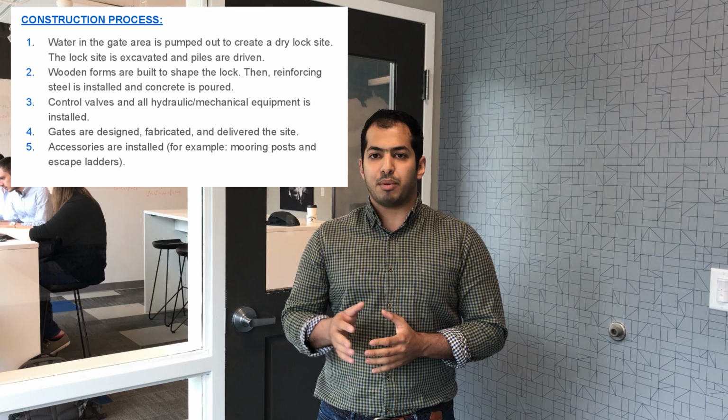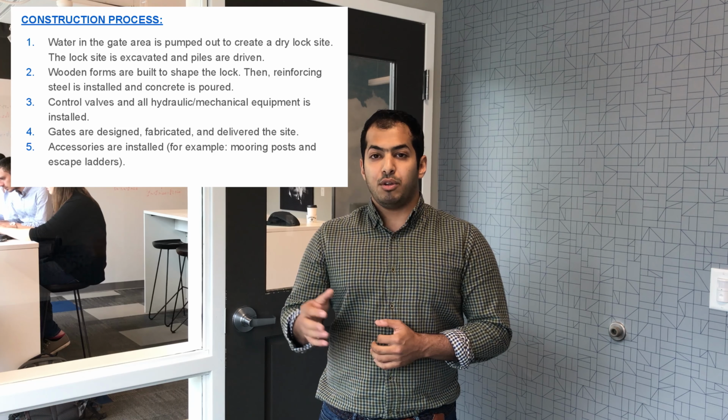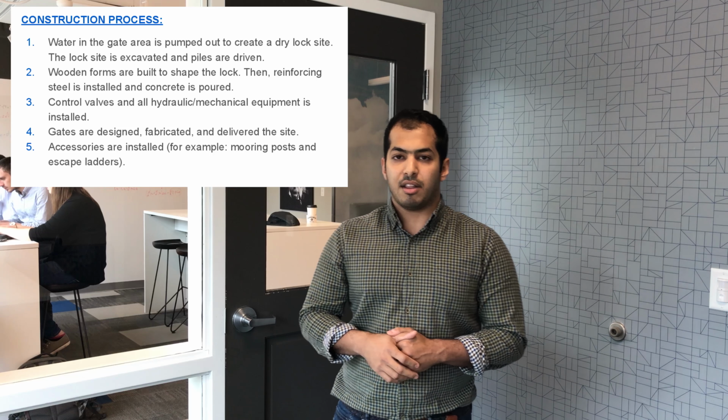Waterways, locks, and gates are used for water control and transportation. The construction process for such locks and gates is as follows. Water in the gate should be pumped out, and after letting the area dry, piles will be used in the geotechnical work to support the soil.